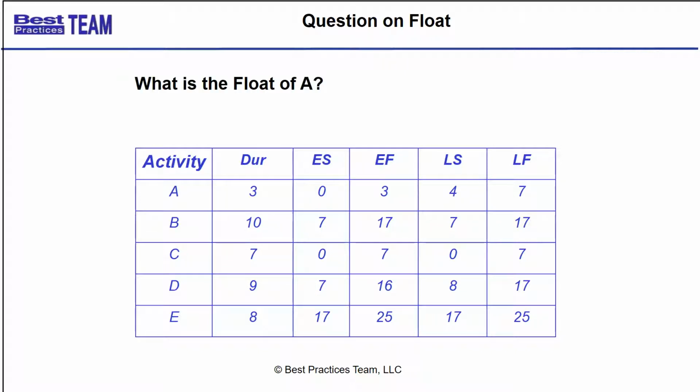So one more problem then, what's the float of A? So same thing, just subtract early finish from late finish and you'll get 4.